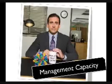Next, we look at management capacity. Now, once leadership has decided on your course, you have to understand if your management skills are available and if your managers are ready. Now, your managers should be able to set priorities for their staff. And sometimes Michael from the office, he lacks some management capacity to lead his staff towards a common purpose successfully. So during this time, we're assessing the ability of their managers in a current position in terms of their knowledge of EHRs, their ability to lead people, and the time that they're able to dedicate to the project, the staff that they have available to them, and if they have the ability to reallocate time for this project.